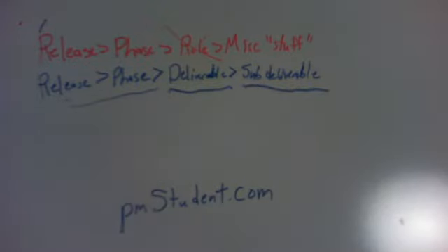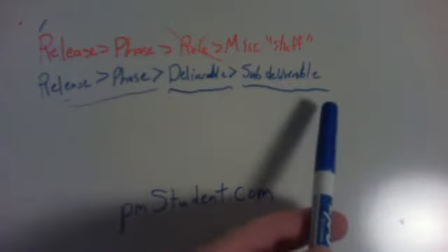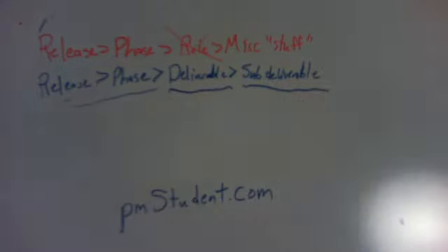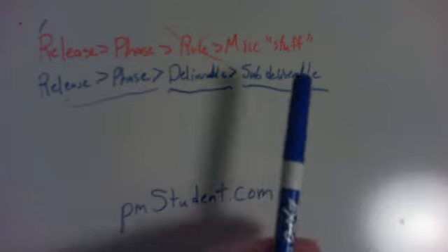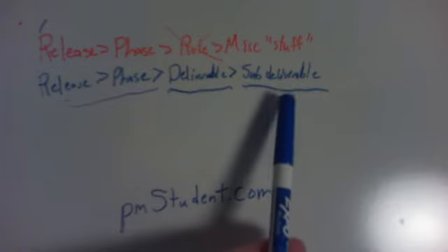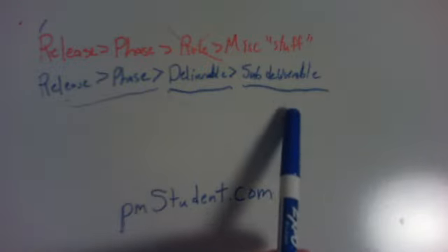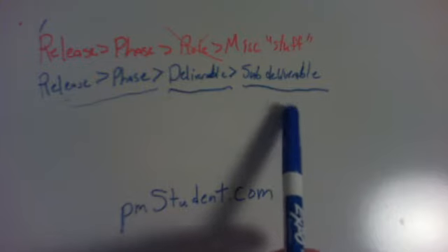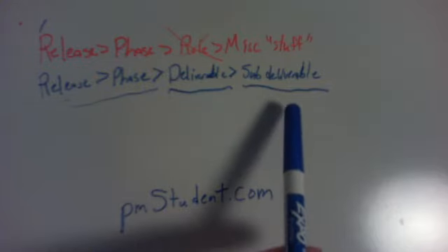It really depends on how large that work package is. The work package is wherever you end up at the end of your work breakdown structure. If it's too large, and you can clearly see that it can be broken down into these subdeliverables, go ahead and do that, because that's going to help you do your estimates. It's going to help you organize the work. It's going to help you generate tasks and do a basis of estimates from there.